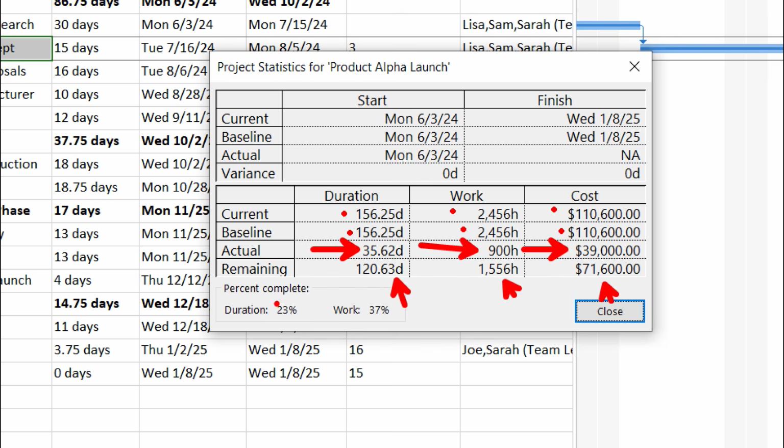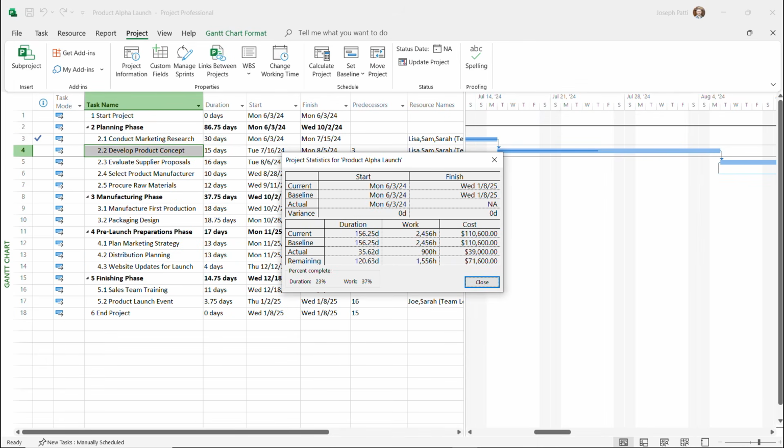Towards the bottom here, you'll get another little report that tells you the duration and also how much work was completed. And we're going to talk about the difference between our durations and our work. Durations are based off of days, work is based off of the hours within the day. And by default, we have Monday through Friday for a project plan, weekends off, and each day is going to be 8 hours of work. So I'll just close this out just like that.